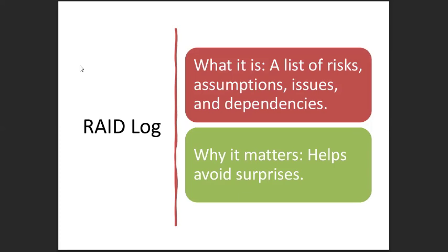It helps you to avoid saying, oh, I did not see it coming. Now, there can be instances where you did not see it coming, except for some special instances of coincidence, or where things play out outside human comprehension or predictions, like COVID, for instance. When COVID struck, a lot of projects suffered. So those sorts of uncertainties could play out. But what we are saying here is that there are certain surprises that you are not supposed to have. For instance, if you want to construct a building in an environment where there is a history of earthquakes, you should put that into perspective, that there's a risk that there could be an earthquake.